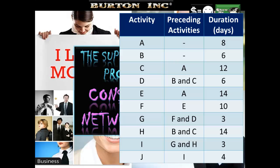We've got our activities here, A through to J, and the duration in days on the right hand side. Preceding activities: C can't begin until A is completed. D can't begin until B and C are completed.